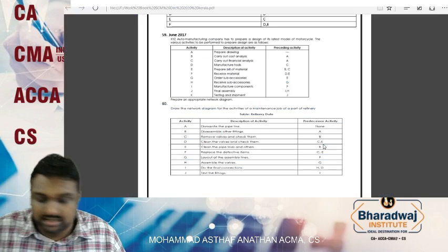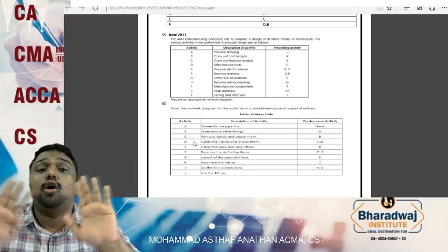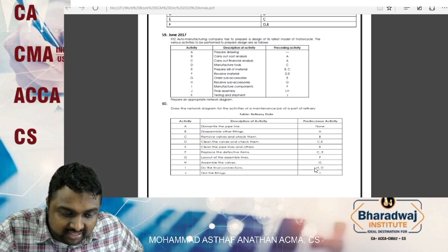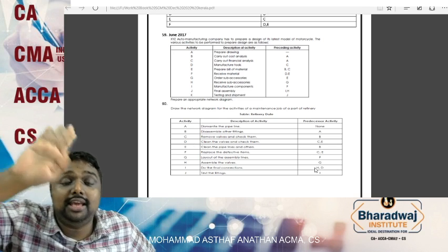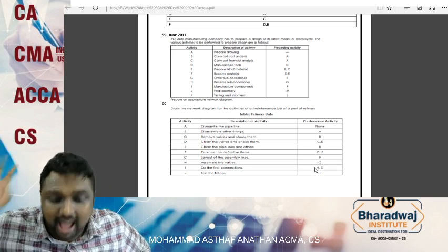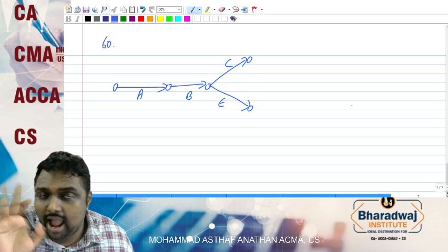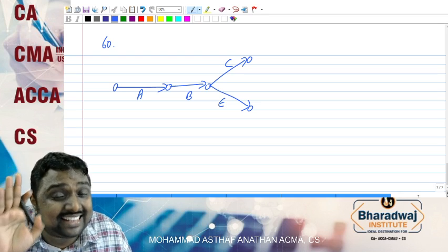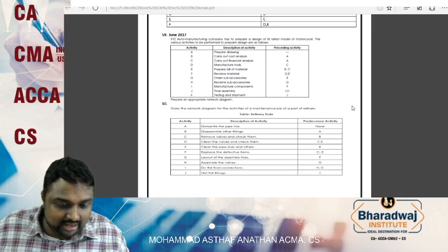Now next, C and E. Yes, C and E together, D starts. Don't go in a hurry to draw D because D comes with H. So unless you come to H, please hold D in your mind. I know some of the friends may have already drawn a dummy. I don't want to say anything wrong, but please hold. Otherwise, unnecessarily you have to bring a dummy. So hold D. We will draw later.